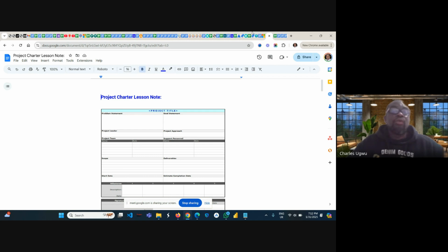So that's why it's important to get a project charter as an authorization. After the first stage, which is the initiate stage, the business analyst must have planned everything and made a recommendation. The business analyst can recommend that you go on with the project or you cannot go on with the project, or you can implement the solution or not.